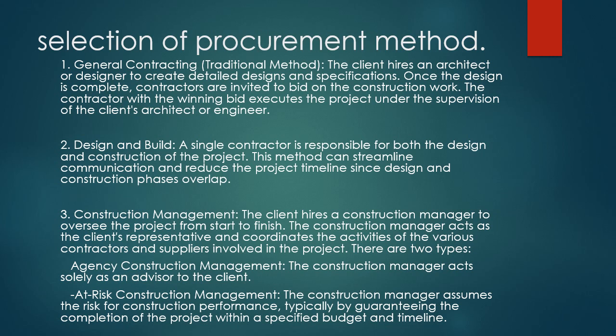At-risk construction management. The construction manager assumes the risks of construction performance, typically by guaranteeing the completion of the project within a specified budget and timeline.